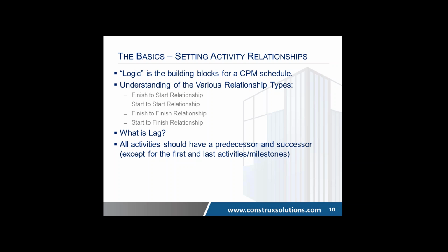Let me give you a few examples of a finish-to-start relationship. I cannot begin putting in drywall until my windows are put in, because you don't want to get any of it wet. So until you're 100% watertight, you will not start putting drywall in. That would be a finish to start. The windows would be the predecessor to drywall, and once windows were 100% complete on a given floor or in a given building, then you would start drywall. Same thing with roofs. I will not start putting drywall in until I am done putting on my roof. So that would be a finish to start tie.